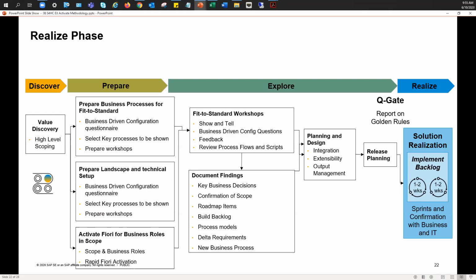Next, you're going to prepare your quality assurance system or quality system and make sure it's configured and available to use for comprehensive testing in a production-like environment. If a customer selected the model company with the direct setup approach, you can deploy the configuration directly from the dev system into the quality system. You first build the extensions and the integrations in the dev or exploration system and then transport to quality. After testing and validation in quality, you then are going to deploy everything into production.